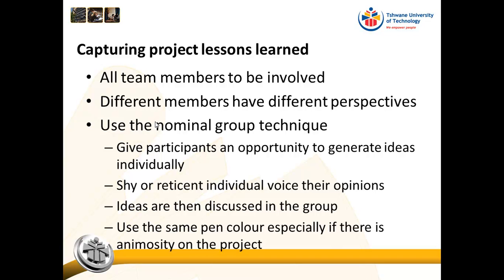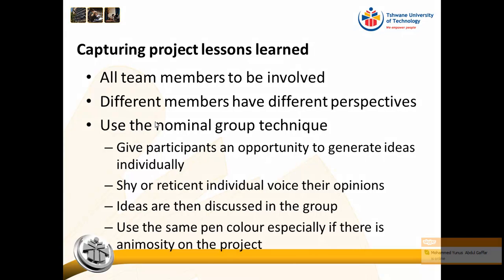I suggest using the nominal group technique because it gives participants an opportunity to generate ideas individually. It also allows shy or reticent individuals to voice their opinions by writing them down anonymously, making them far more likely to give an honest opinion. The ideas are then discussed. If there is animosity in the project, you can have everyone use the same color pen and write with their non-dominant hand so that people feel comfortable responding honestly about what went well and what went badly.